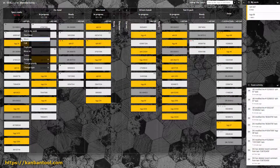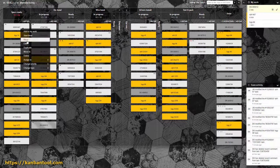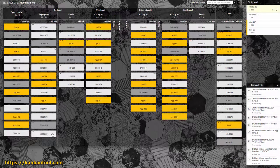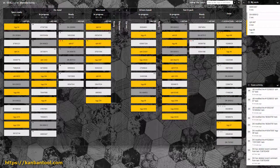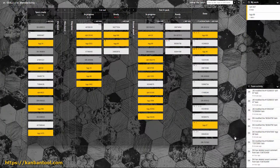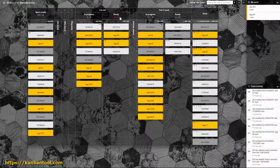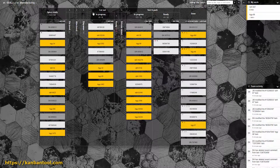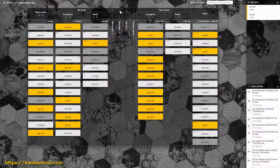The other way in which WIP limits work for production line Kanban applies to application of the pull approach. Each later stage needs to signal to the one before it when more items are required. By setting a WIP limit for ready columns, it becomes clear when more items are needed to fill that requirement.